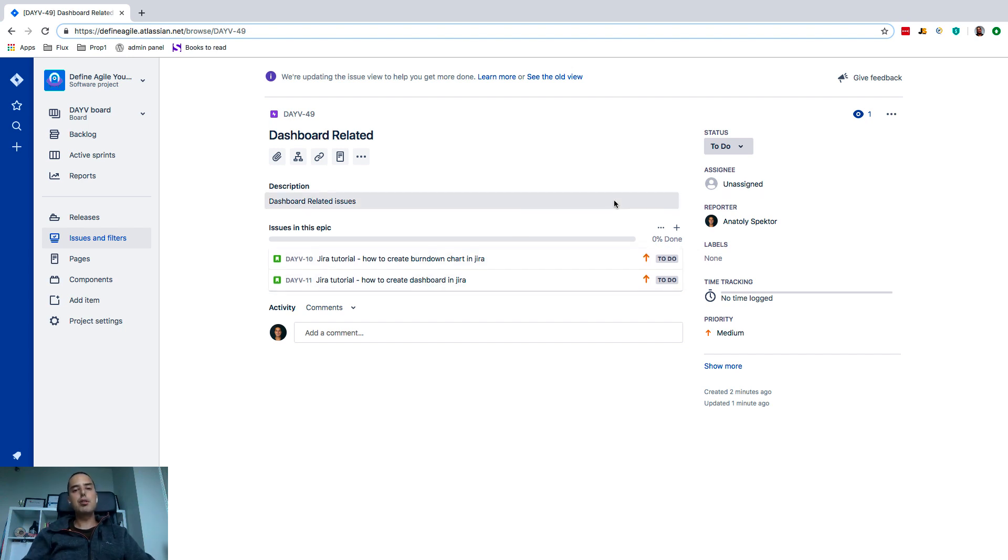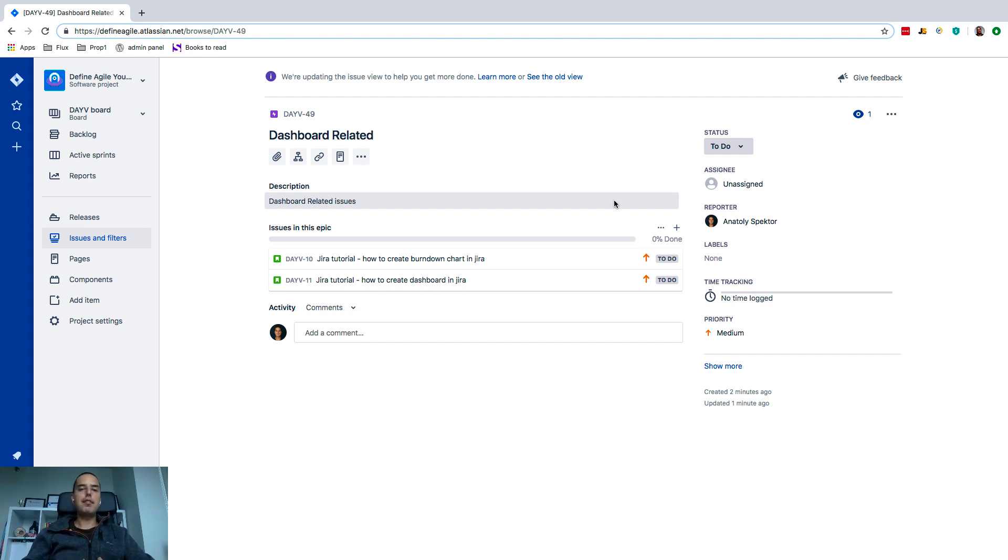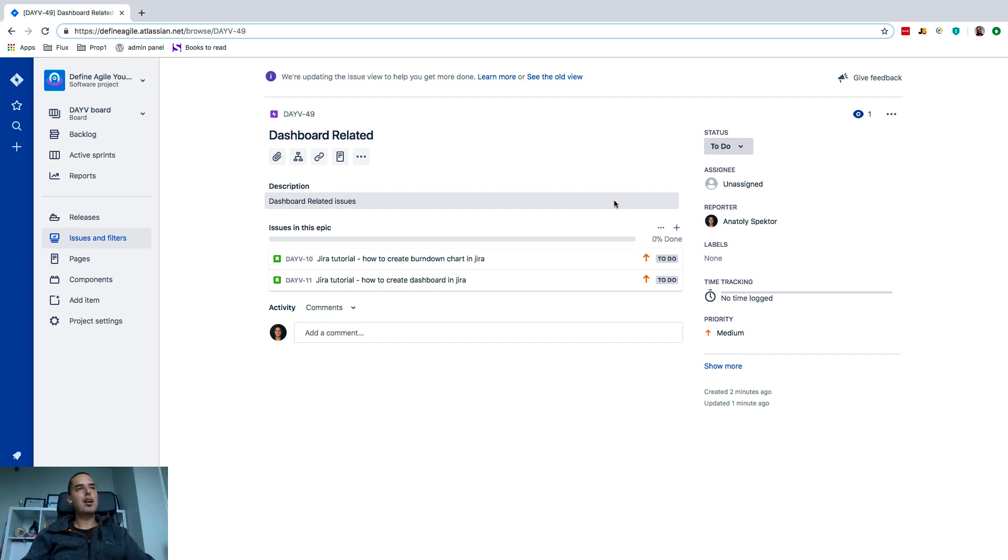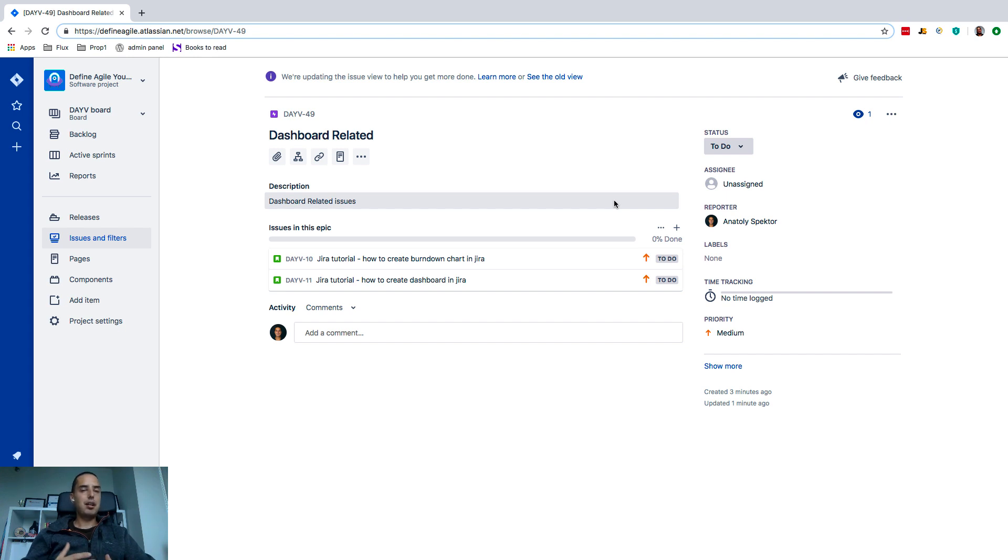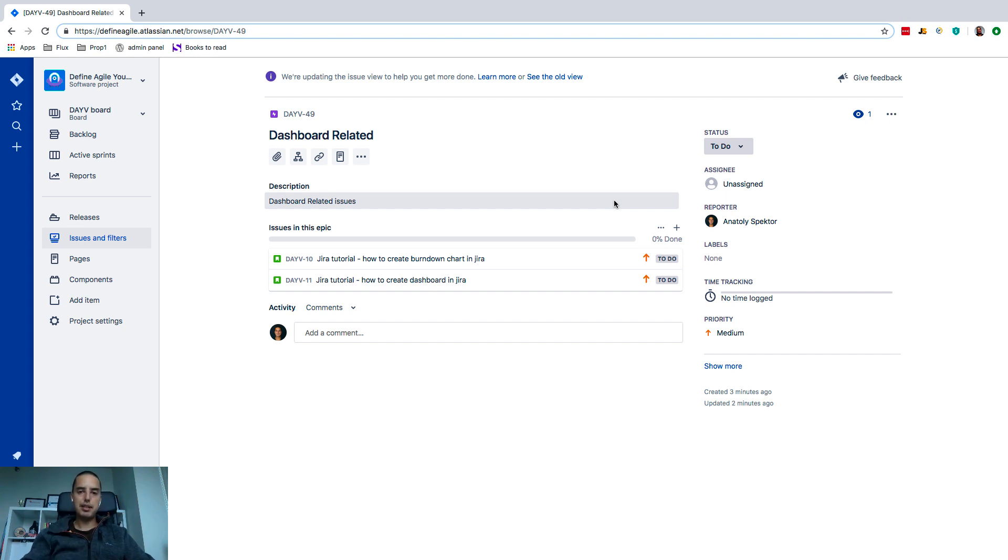I highly recommend you use epics. Don't overuse them, but if you have like five or six related issues, please put them in an epic because it's good at a glance to see what is in there. You can track some numbers, how many story points this epic has, and you can predict when it's going to be done and stuff like that. It's very useful, so I highly recommend you use epics.